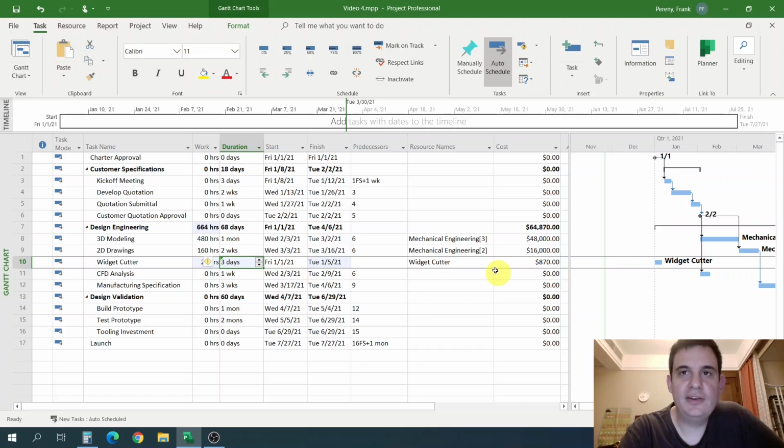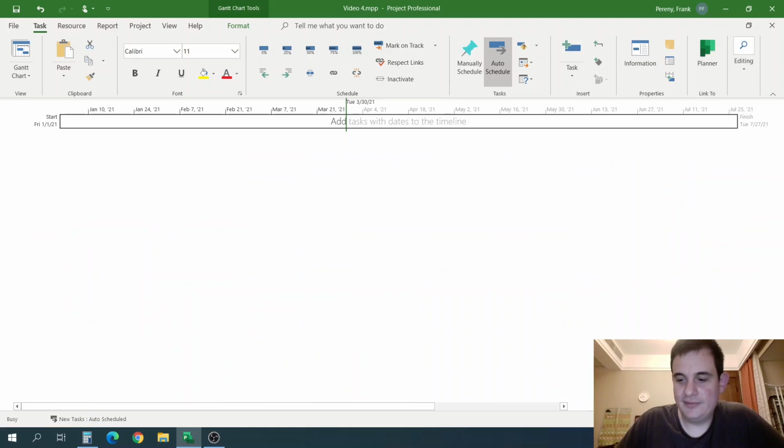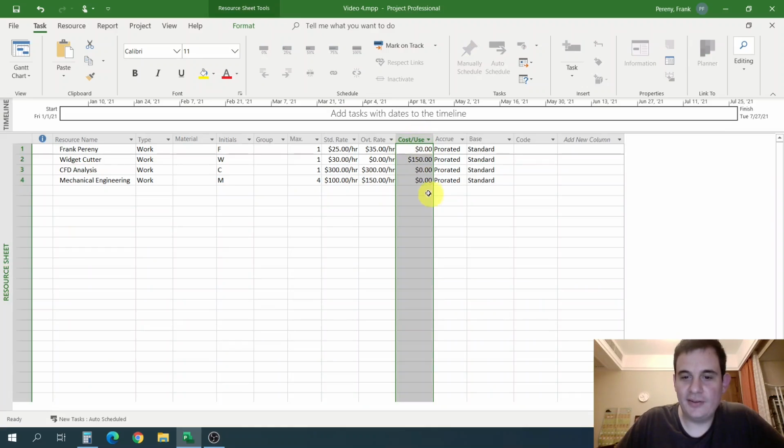And like I said, a good use case for that is things like one-time fees, setup fees. It's kind of like when you call the cable company and they want to come and set up your cable. Of course, you have to pay for cable every month, but sometimes you have to pay that $29 activation fee. Well, you only pay that once. Once you pay that the first time, doesn't matter how many years you have cable, you shouldn't have to pay for that setup fee again, unless you're getting ripped off. So that's the use case for a setup fee by cost per use.